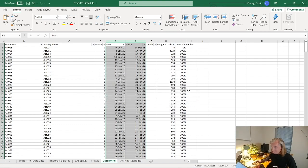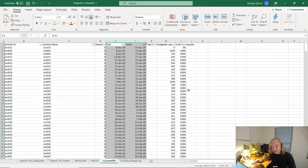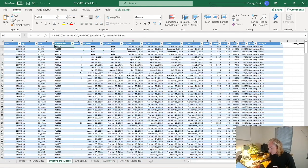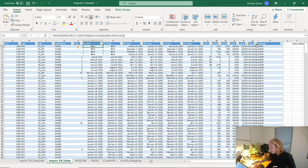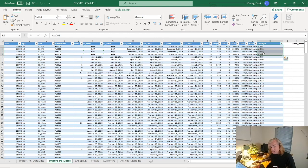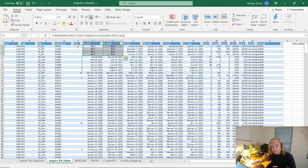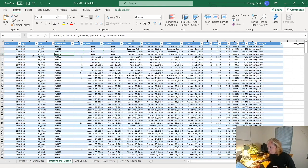Same thing with the dashes - there we go. I do this every time. It's a little manual step, but sometimes you'll notice that if you do something in Excel you save about 50 hours of frustration in Power BI and your databases. Just make sure it's nice in Excel and you're good to go. Obviously I'm just doing lookups to those three tabs. Some activities might be inserted into your schedule and if they are, they will not show up in your baseline, and that is exactly what we want to look for. We want to see blanks since that's our little key. It still gets imported to Power BI, no problem with that.